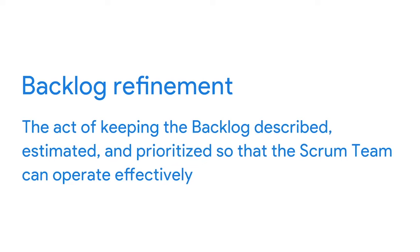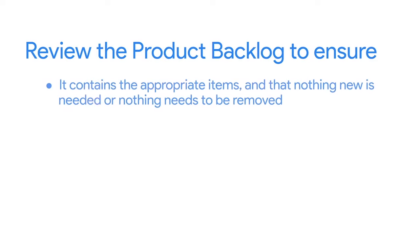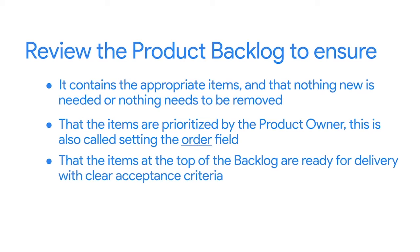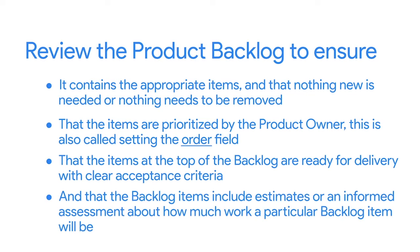We've been exploring everything about the product backlog. Although the product owner owns the data in the backlog, the team must work together to keep this living document up to date through a process called backlog refinement. Backlog refinement refers to the act of keeping the backlog described, estimated, and prioritized so the Scrum team can operate effectively. It involves the product owner and some or all of the Scrum team reviewing the backlog to ensure it contains appropriate items, nothing new is needed, items are prioritized, top items are ready for delivery with clear acceptance criteria, and backlog items include estimates.